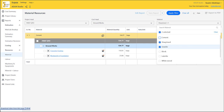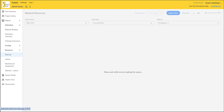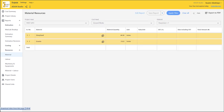Our focus here is just sub-structural works. This is sharp sand and granite. Click apply filter — once you do this, you see your sharp sand here. The summary is 46.50 tons, and your granite is 26.6 tons. This is the total quantity for your sharp sand and your granite that will be used completely for this sub-structural work.